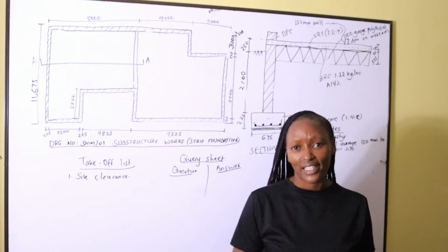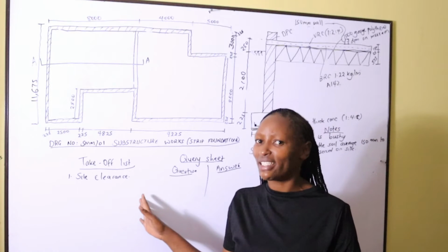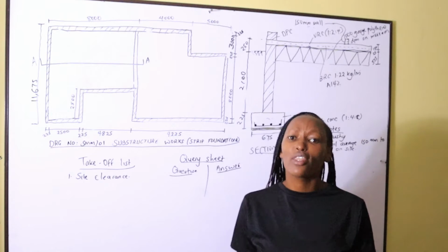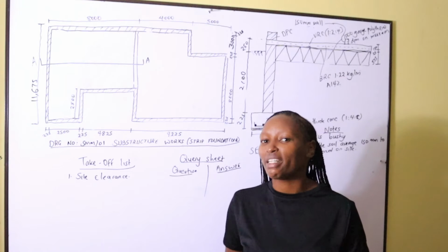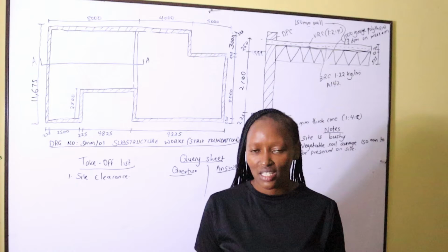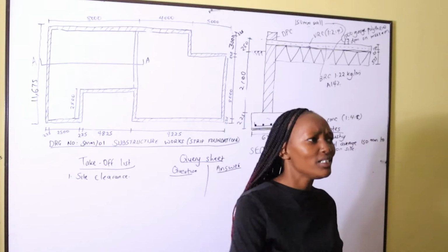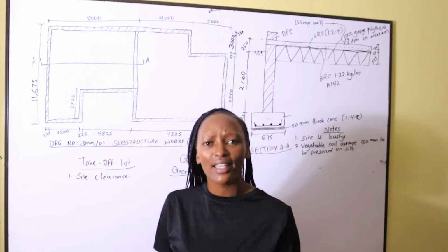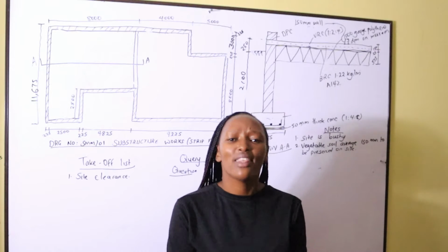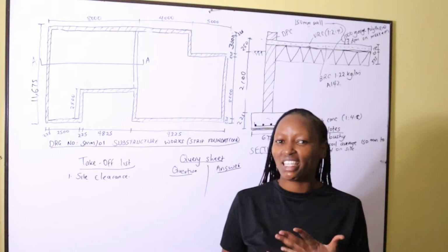So we have cleared the site. Another good thing you should note is that when we are measuring things like site clearance, we are not measuring site clearance for the whole site. The whole site is usually measured under preliminaries. You see, there are these things that we do prior to constructing on the site. Maybe the site was very bushy, it had so many buildings, and we shall build the site huts, the toilets, but now all that area, anywhere that the building does not occupy, is measured under preliminaries. Preliminaries are things that are done prior.